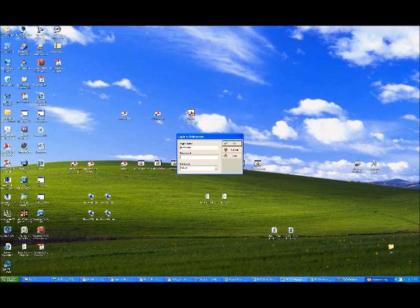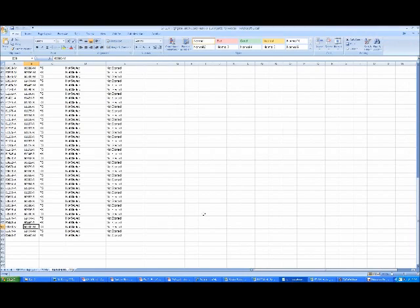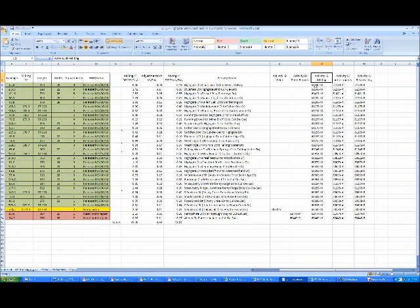I'm going to go back to here and just show you how we built the activity IDs automatically, and it was done right here. What we did is we said concatenate the facility ID in D3 with this token called -M for milling. So there's just a concatenate formula for this activity ID. And the adjusting is the same way. It's just a concatenation of the facility ID with the suffix on it. Does that help? Yeah, I think so.